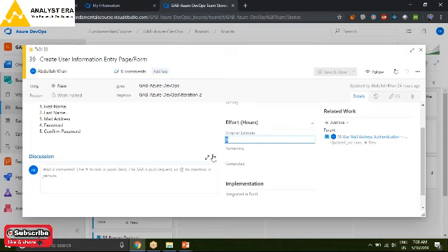When we are working with Scrum, who is saying it? It is the developer who is saying it. I will take 8 hours. If a fresher is given the same task, then he might say I will take 13 hours, because he has freshly passed out and can't understand things as well. It depends upon the resource who is working on a particular task. That is how we estimate tasks.